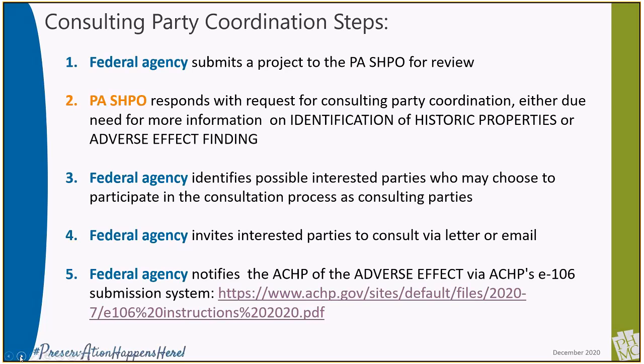And many times they do not elect to participate in consultation, but the requirement to reach out to them and issue an invitation is part of the adverse effect process. If the project does not have an adverse effect, you would not be required to document these efforts. But if you are demolishing a contributing building in a historic district, that's when you need to start thinking about who you need to invite to a consulting party meeting, even if it does end up being just you and the borough or township and the SHPO office who end up participating in consultation. I hope that answers it.